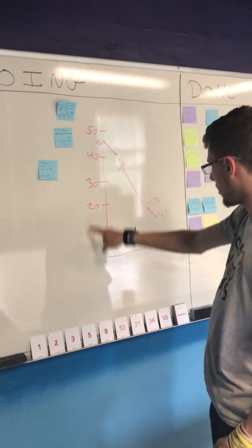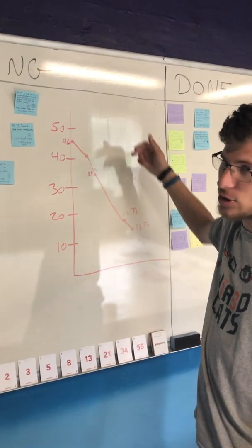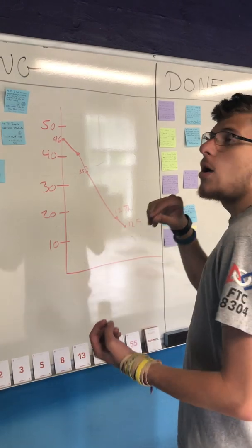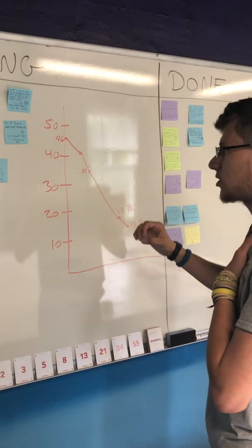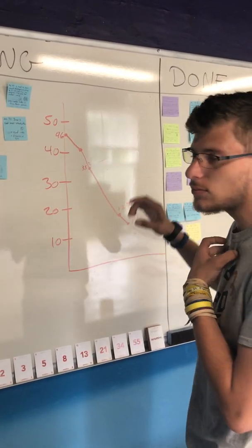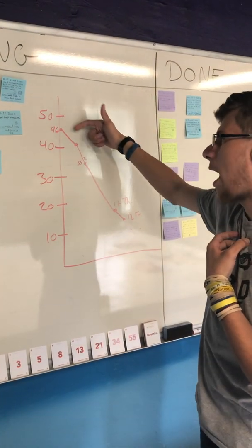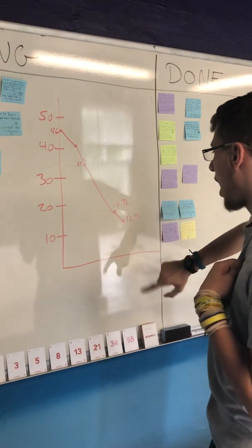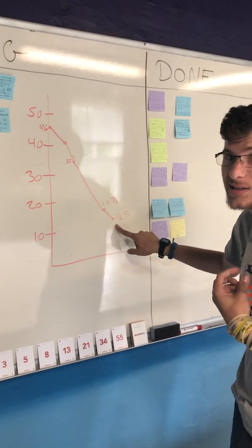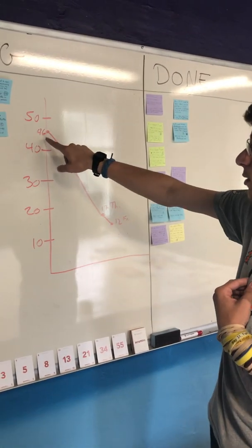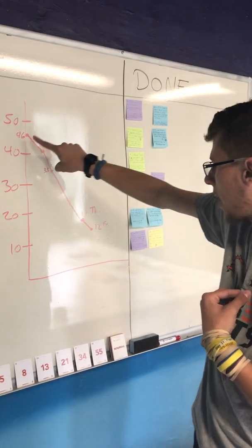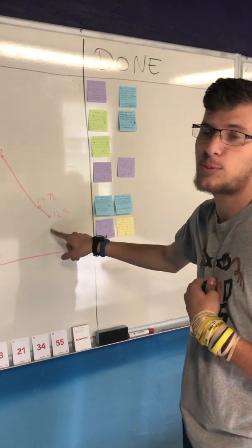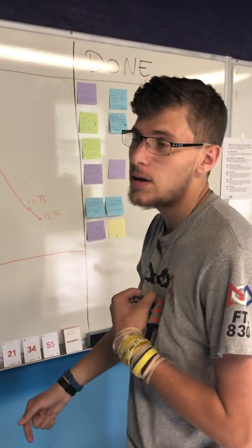And here, if you look at this, we have what's known as a burn down chart. That burn down chart is a way for you to track how many total points you have to complete, when points are getting knocked off, and how many points you have left in that sprint. I started this week with about 46 points worth of work, and I have about 12 points left. This sprint ends coming up Monday.